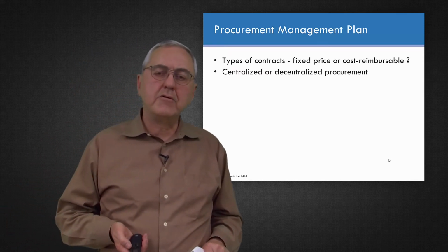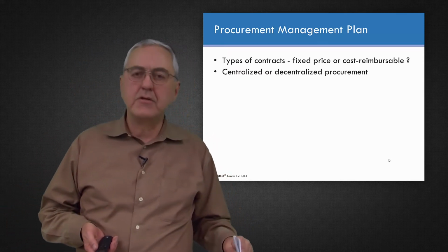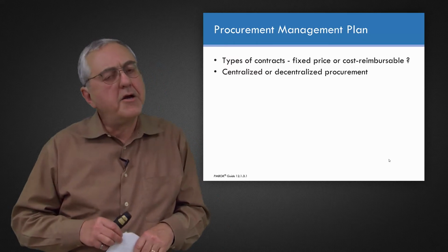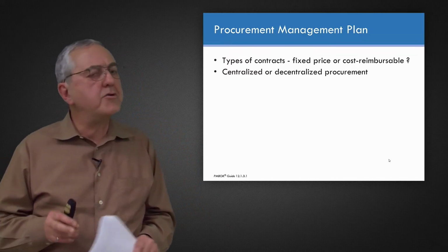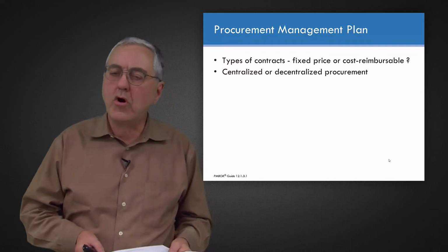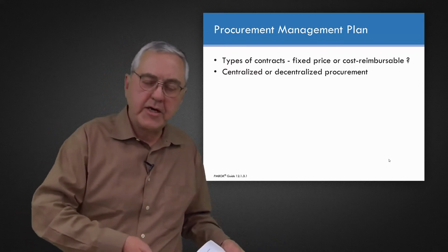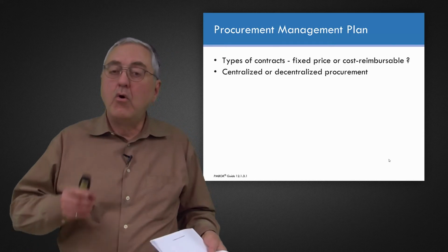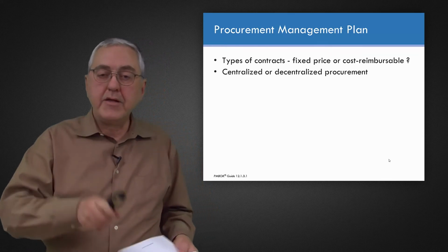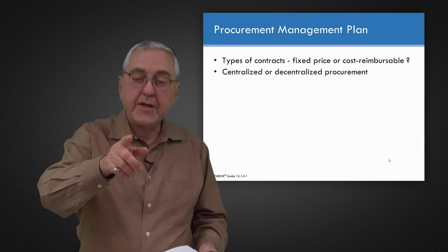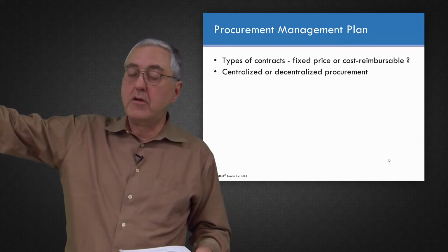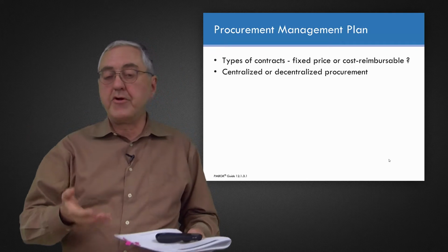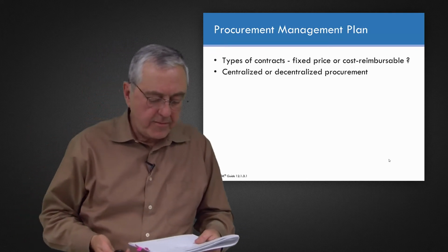You're also going to think about centralized or decentralized procurement. Are you, the project manager, going to do the procurement function of going out to the marketplace and then making an award of contracts to your designer and to your renovator? Or is your company telling you that you're the project manager, but you're going to use our central procurement department to do those processes for you and with you?